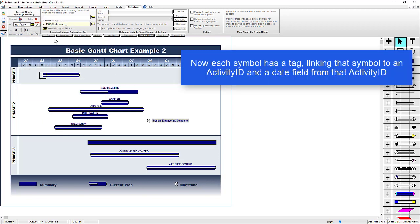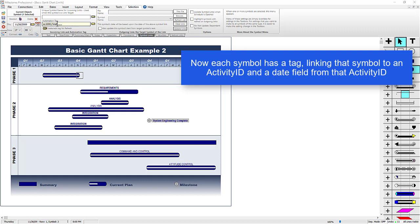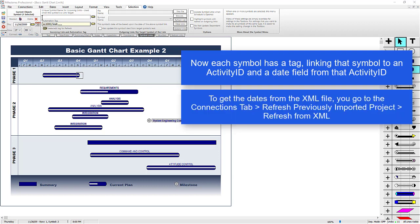And then you can see both of those tags were built, so EC1000 Start Name and EC1000 Finish. Now both of these symbols are linked, and if I want to get the correct dates for these symbols from the XML file, I have to go through the Refresh process. So if I go to the Connections tab, click on Refresh Previously Imported Project.